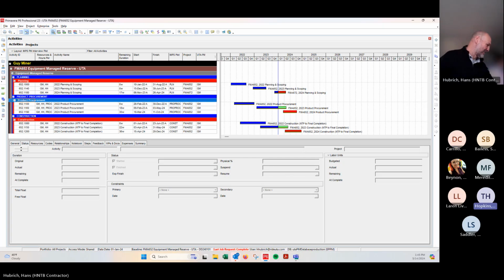Yeah, I do. And I can't remember which it was. It was really just trying to get alignment with the group on, are we calling this the Q4 2023? Because before the instructions came out, I'd been using a data date of January 1st, 2024 and calling it my Q1 2024 update. I'm updating the schedule as of that date, looking forward, versus using December 31st, 2023, and looking essentially back, as we're calling it, Q4 2023.